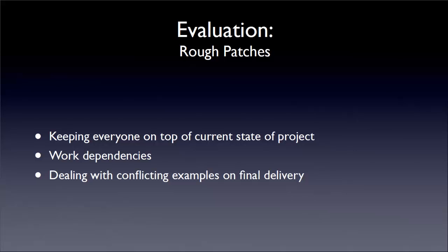As we were learning a lot of new information every week in classes, it was critical for our team members to keep up with the lecture notes, and there were a few times when members needed to be reminded gently. Another issue we ran into was assigning deliverables that relied on one another to separate members. This resulted in some members not being able to do their assigned task for that week until another member finished his or hers. Finally, due to the amount of examples posted on Moodle, it was unclear what was expected other than core diagrams.